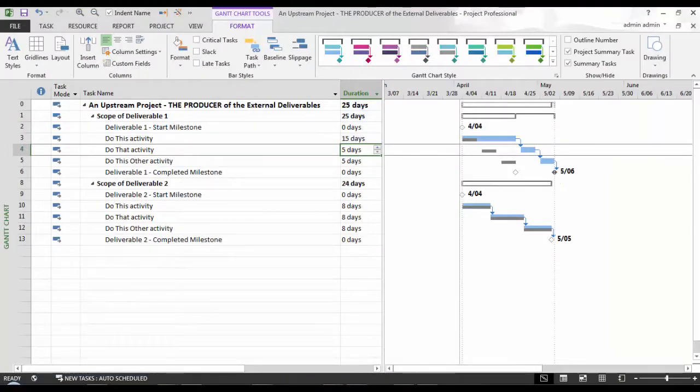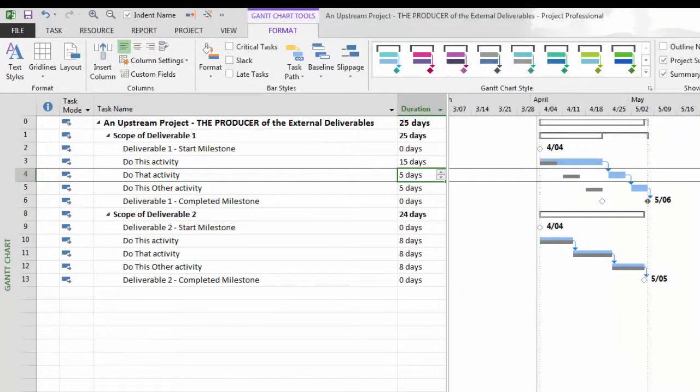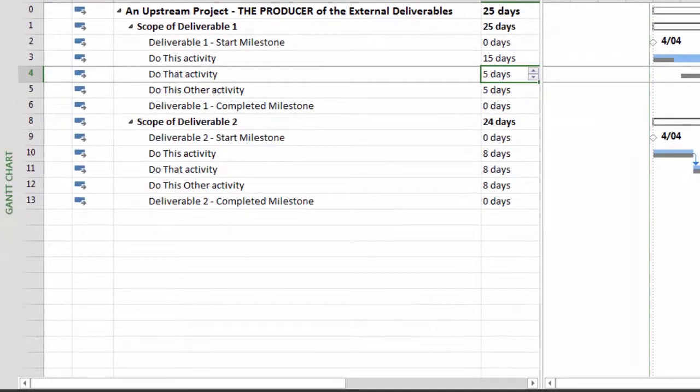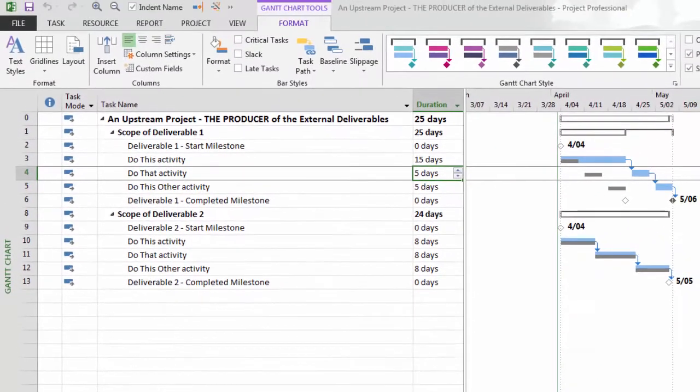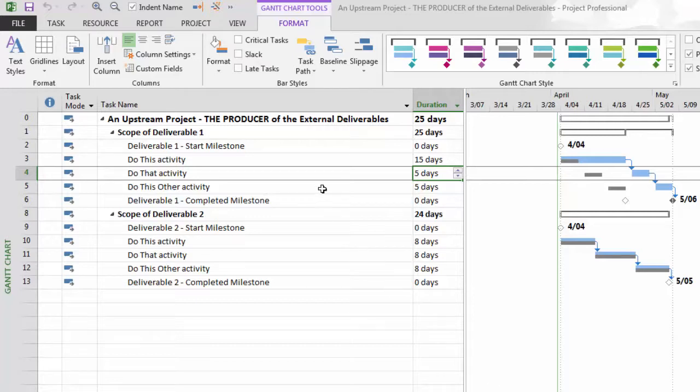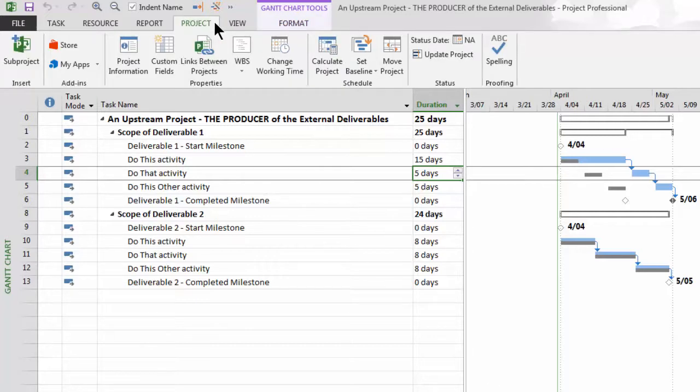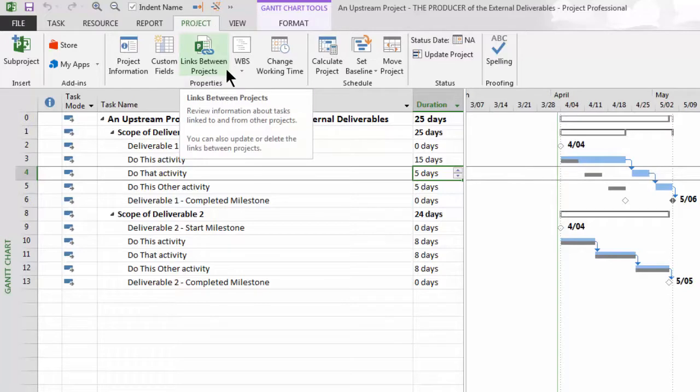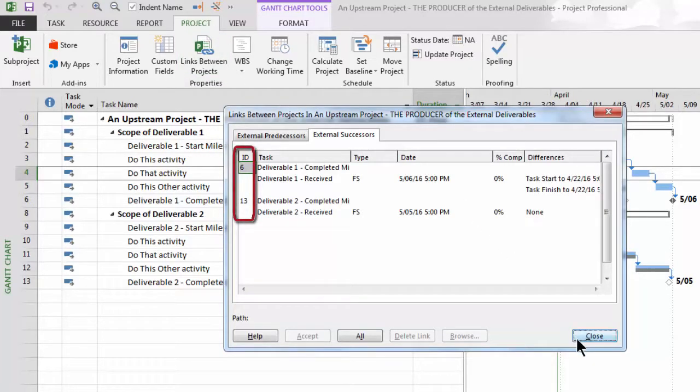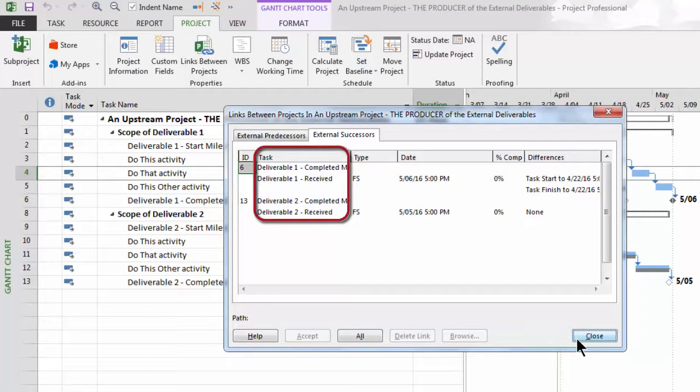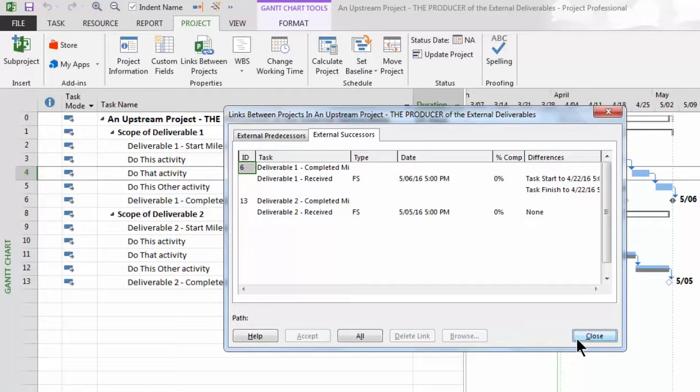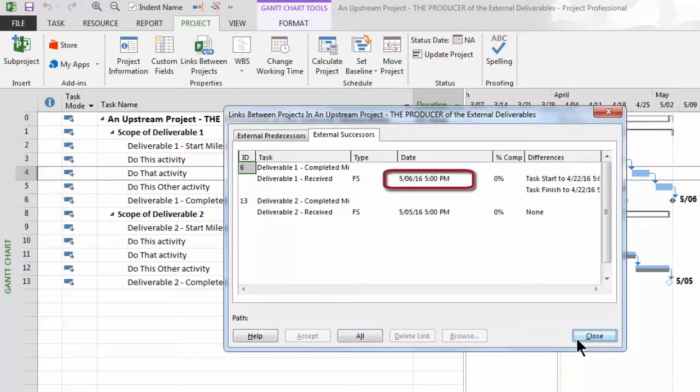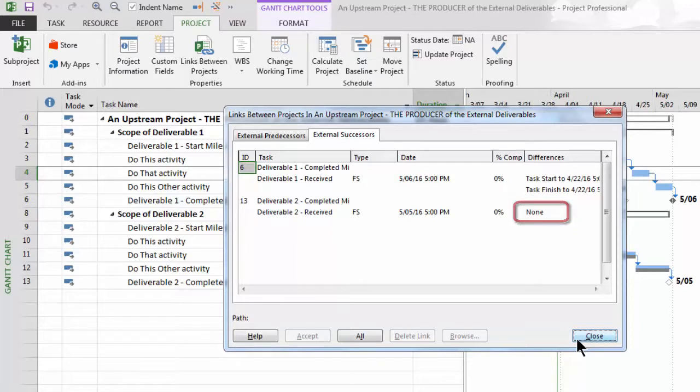Once I click OK, we'll confirm that the external successors will no longer be displayed. Moreover, I can confirm these external successors still exist and can be found even managed in the Links Between Projects window that can be opened from the Project ribbon. We can see both our external dependencies here, driven by our current project's line ID, 6 and 13, and the task name of our external task, deliverable 1 and 2 received, and the type of dependency, FS for Finish to Start, the date, percentage complete, and any differences. In fact, the interface has recorded the impact given the simulated change I made in the task duration a few moments ago. Thus, the original date of April 22nd is listed in the Difference column and the new date of May 5th shown in the Date column.